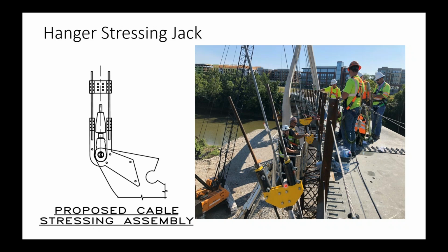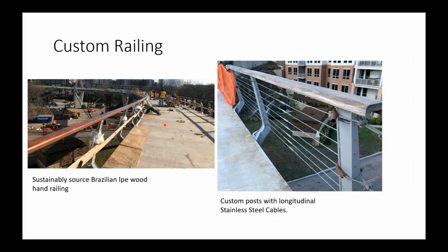So having multiple ones of these, I would even suggest 2 or 3 of these or more, is going to be a time saver. You can have one crew actively working on one while another crew is removing the previous one and moving it to the next stage, to get you ready to stress. So that's one thing to think about in this type of procedure. Any of those long lead items, having spares.